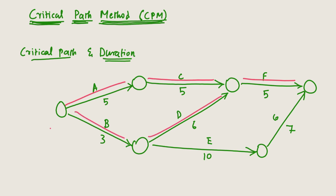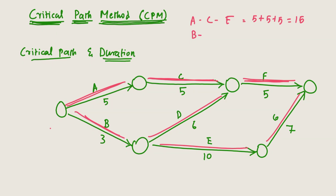The second path is B-D-F, and the third path is B-E-G. For path A-C-F: 5 + 5 + 5 = 15 days. For path B-D-F: 3 + 6 + 5 = 14 days to complete the project.